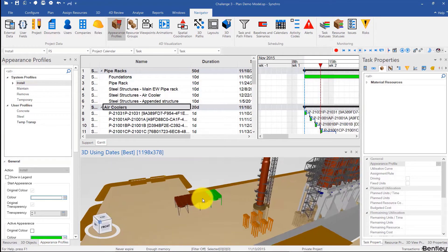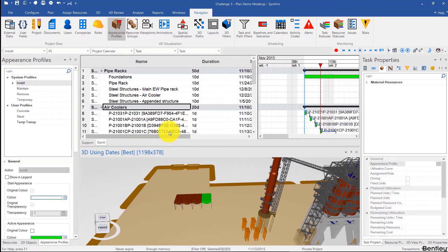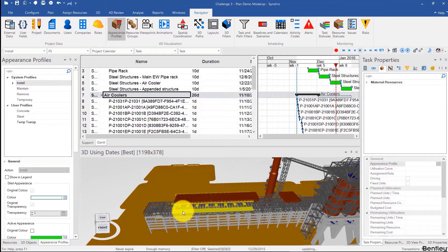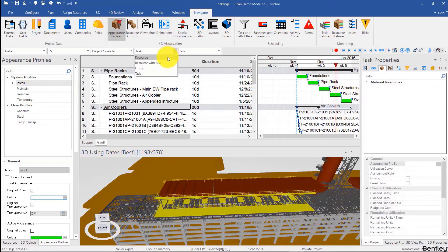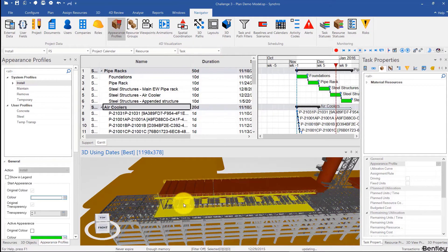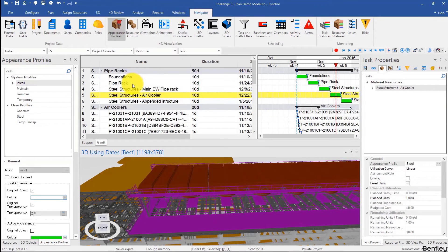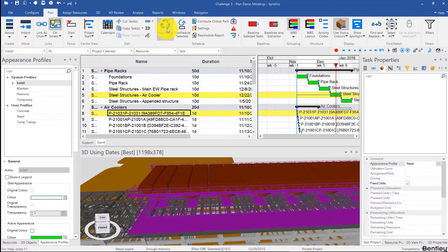However, the first one starts popping up in the model way before the structure that supports it does. So I can find that structure just by scrubbing through the focus time — there it is. I'm going to click on that, right-click, select assign to tasks, find that task, then click on the first air cooler activity, Ctrl+L for link, and then go to plan or just use F9 and reschedule.